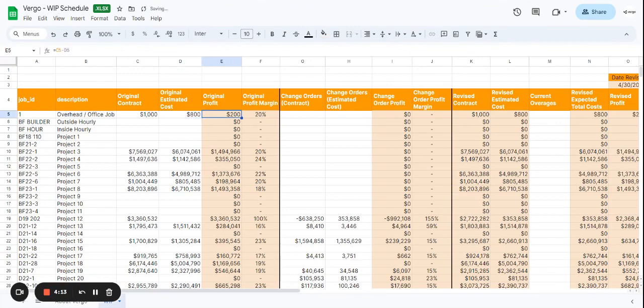That gives us here, as I mentioned, it's going to calculate on its own. It gives us a $200 profit with a 20% profit margin.